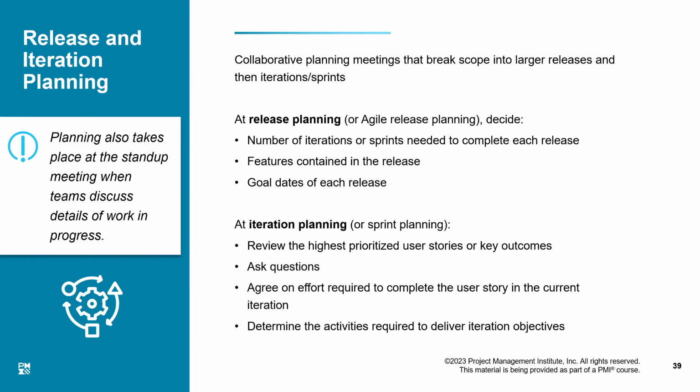Now, in iteration planning, the job the team has committed to do in their next iteration would be presented to the product owner, and the product owner will approve it. Then you can take those items away from the product backlog and start working on them.